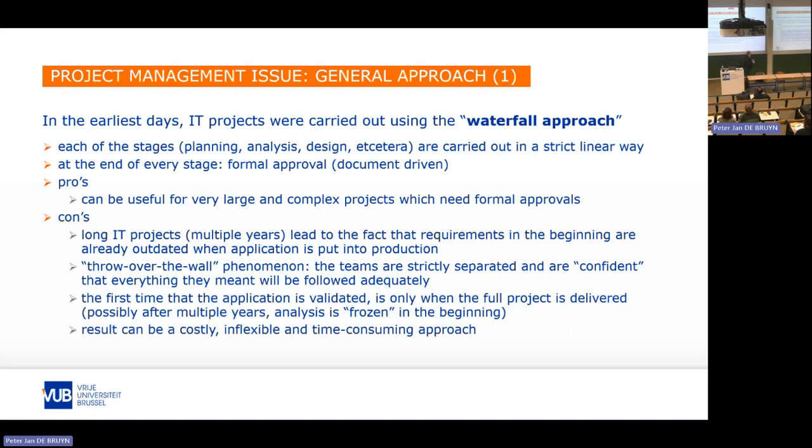It also facilitates a lot of the throw over the wall phenomenon, which is known in that world as the fact that people feel very safe when they create something, they finalize it, and they say, okay, the analysis is over. We don't care about the design and implementation anymore. We have done our job. We've put on paper, you guys should do this, and the other ones should take care of it. Whereas actually you want involvement of certain stakeholders throughout the whole project. You want them to be informed. If something cannot be realized, is there an alternative? You want to make sure that everyone understands very well what you've written in terms of requirements. So that throwing over the wall phenomenon is also a risk.